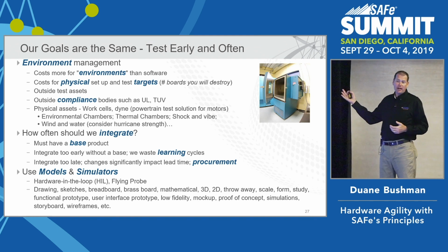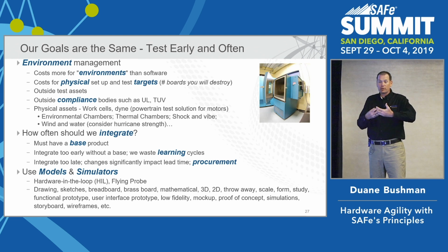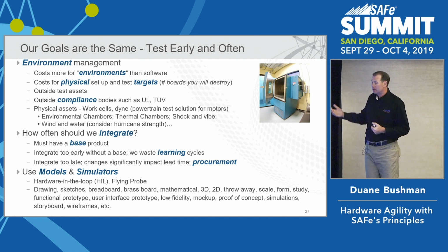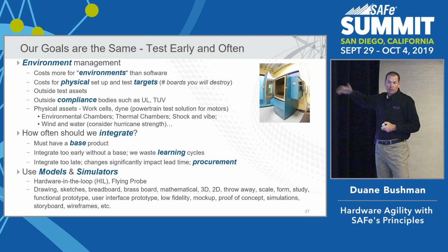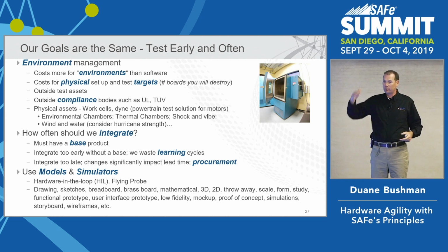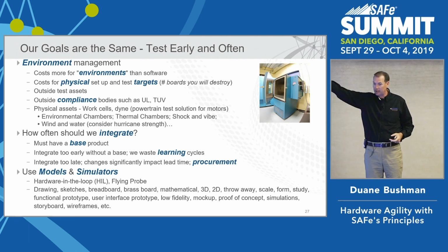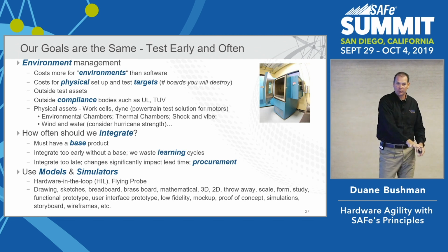And oftentimes we'll use a BVIR, Big Visual Information Radiator, for things like our physical assets. What are those? So that way you can go through and understand if a dependency board is great for teams to see where our integration points are and where our bottlenecks may be, where our risk is, where our WIP is. Does it not apply to environment management as well? We've tried to do in some cases where you'll have that dependency management board where you've got your teams running down with your PIs running across, right? Everyone's on the same page when I use that. We've tried to extend that sometimes with our environments at the bottom.